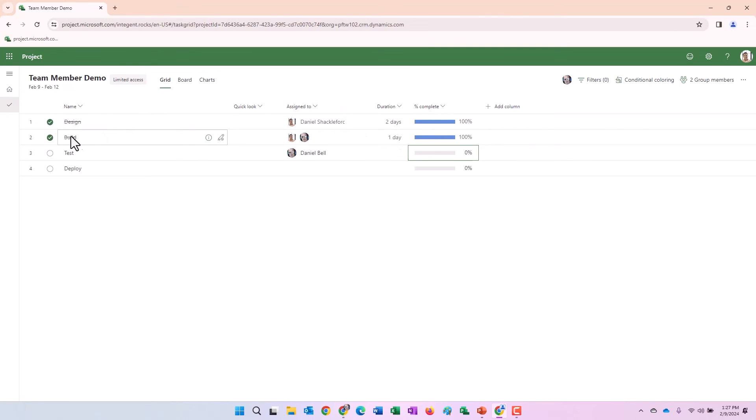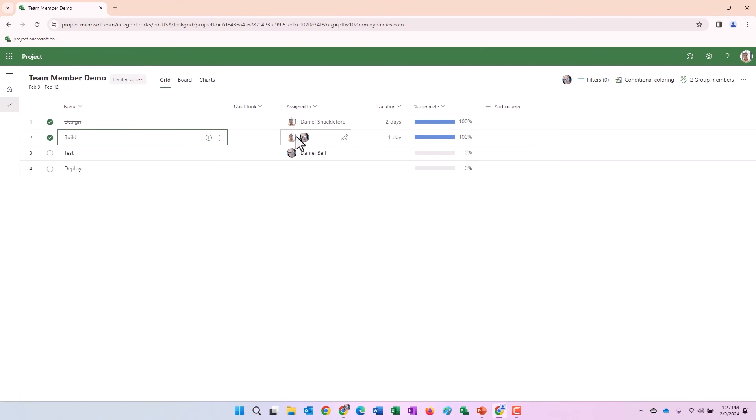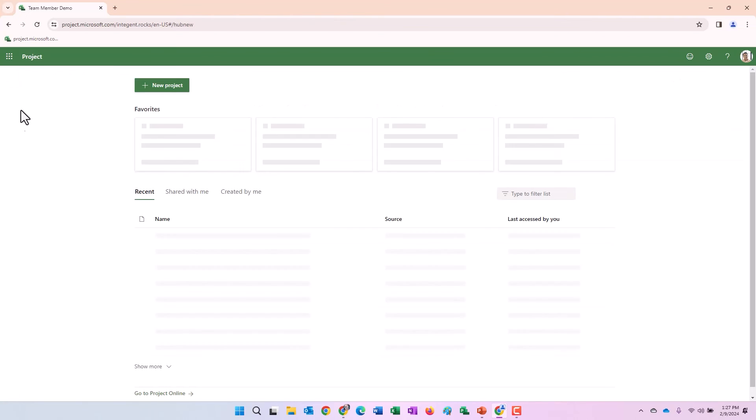And notice it strikes a line through both of them. So this really is indicating to me that both these tasks overall, not just Mr. Shackelford's work, but both overall have been finished completely.